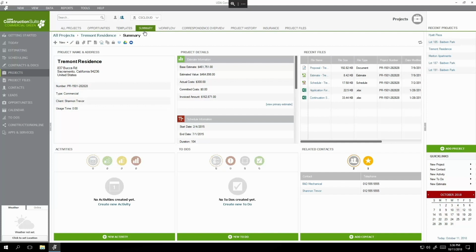And when we do the introduction between the project manager and the owner of the future home or project, or whatever it is that we're working on, I would want my project manager to already have all of this documentation before that handoff occurs, before the salesperson introduces our client to the project manager who's going to be building their perfect home or whatever it is. All of that information should be available, so if you choose to do it this way, make sure that the handoff package is the last collection of tasks in the original workflow before we switch it over to the in-progress workflow.